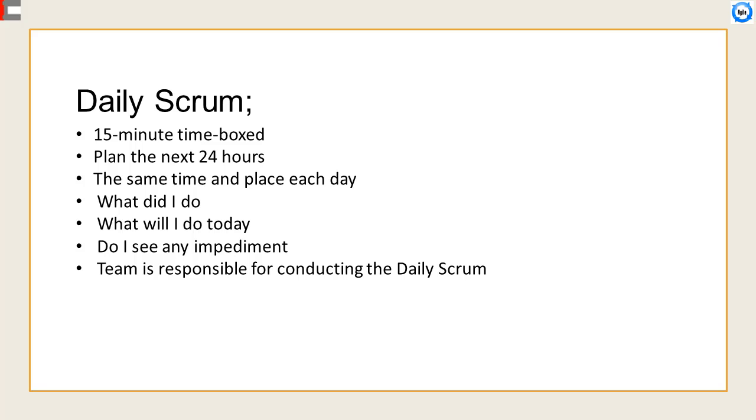The Scrum Master ensures that the development team has the meeting, but the development team is responsible for conducting the daily Scrum. The Scrum Master teaches the development team to keep the daily Scrum within the 15-minute time box. The Scrum Master enforces the rule that only development team members participate in the daily Scrum. Daily Scrums improve communications, eliminate other meetings, identify impediments to development for removal, highlight and promote quick decision-making, and improve the development team's level of knowledge. This is a key aspect.